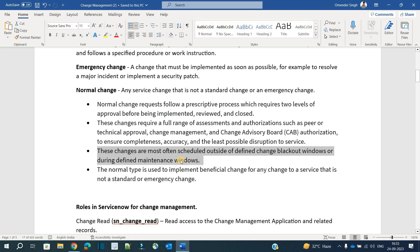These changes are often scheduled outside the defined change blackout window or during maintenance windows. Since these changes might have a huge impact, it is advisable to implement them in the maintenance window where the number of users who are logged in or online is low or probably none.